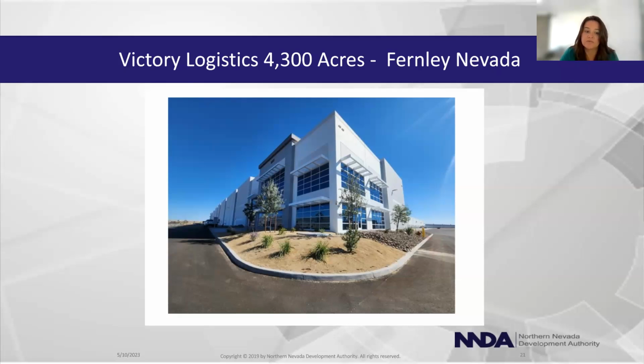Mark IV Capital plans to build a 4,300 acre commercial and industrial park with an estimated potential of 10,000 direct and indirect jobs. The first project completed in Victory Logistics is the first building to be constructed. It is 800,000 square feet of industrial commercial space with 40-foot clear ceiling heights. The building has been leased to Redwood Materials as a warehouse for their logistics facility.